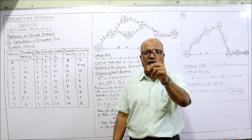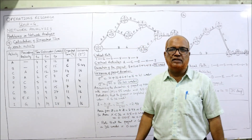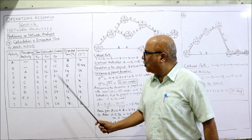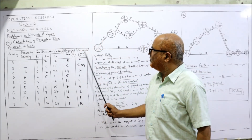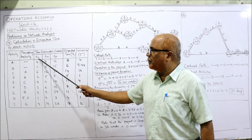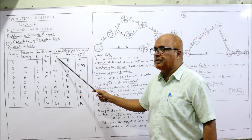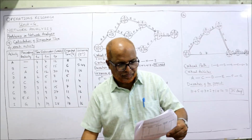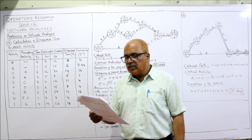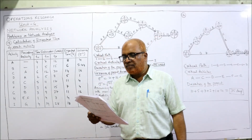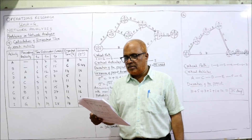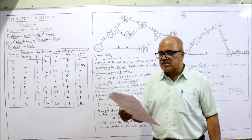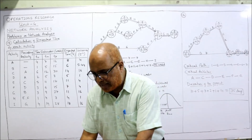We are given time estimates in weeks: optimistic, most likely, and pessimistic. We combine these three times into one expected time TE. The formula for TE is: TE = (TO + 4TM + TP) / 6. The two questions are: first, draw the network diagram and find the critical path; second, find the probability that the project is completed in 36 weeks.